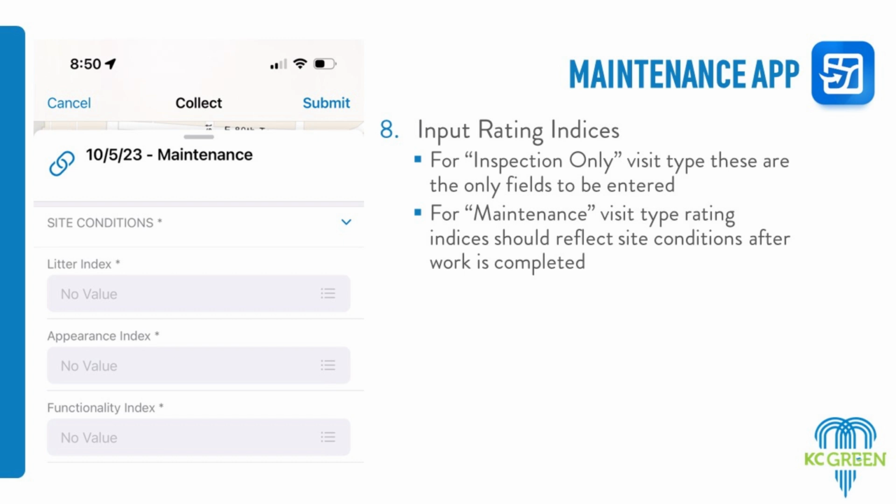We're familiar with the sites, so we're probably going to know, but the other thing is that if there's something you have a question about, Ashley is your contact person. If you get out on site and you don't know what to do about something, we really want you to contact Ashley, send her a photo, send her a message, and let her know what's going on. We will see this, but it's much faster to contact her directly, and that's why she's there, to form that partnership with you while you're out on site. This is the documentation, but if there's a big issue you're seeing, we want to know about that before you take corrective action.